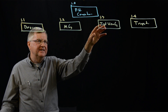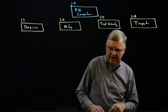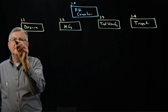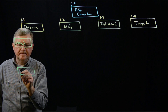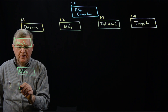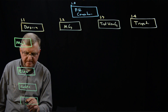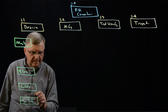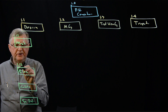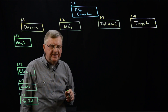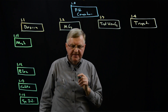Level three gives us a little bit more information. Under design, we've identified mechanical design, electrical controls, and systems integration, labeled 1.11, 1.12, 1.13, and 1.14. In similar fashion, the project manager has identified third-level tasks for the rest of these areas.